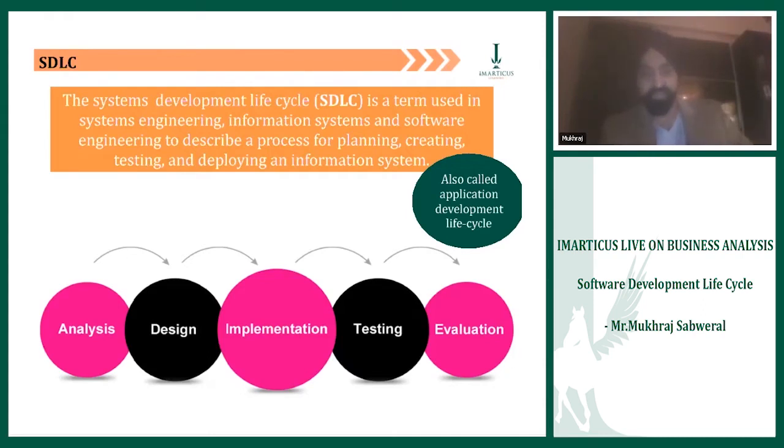So this whole analysis in terms of cost, benefits, risks, and challenges is going to be done by our diligent business analyst, Rajesh. Rajesh typically may spend 10 to 15% of the project timeline on this analysis part. For example, if it is a 1,000 man-day project, Rajesh typically gets about 100 man-days to do this kind of analysis. The analysis, guys, is very deep. It's very evaluative, in terms of arriving at 5 to 6 different answers.